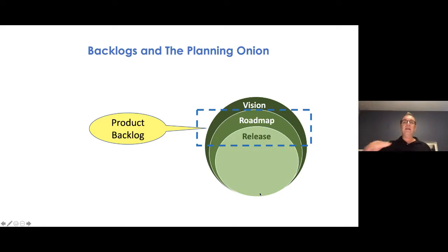And I just draw a line in the product backlog to say, once I've reached this point, that's release one. Sometimes we can anticipate those and plan those ahead. Sometimes we decide them empirically while we're in the midst of the project based on seeing the actual results that have been produced and the value potential that we have out of it. Then within the release, we break our release up into multiple time boxes in the Scrum framework, and we call these sprints. Some refer to them as iterations outside the Scrum world.